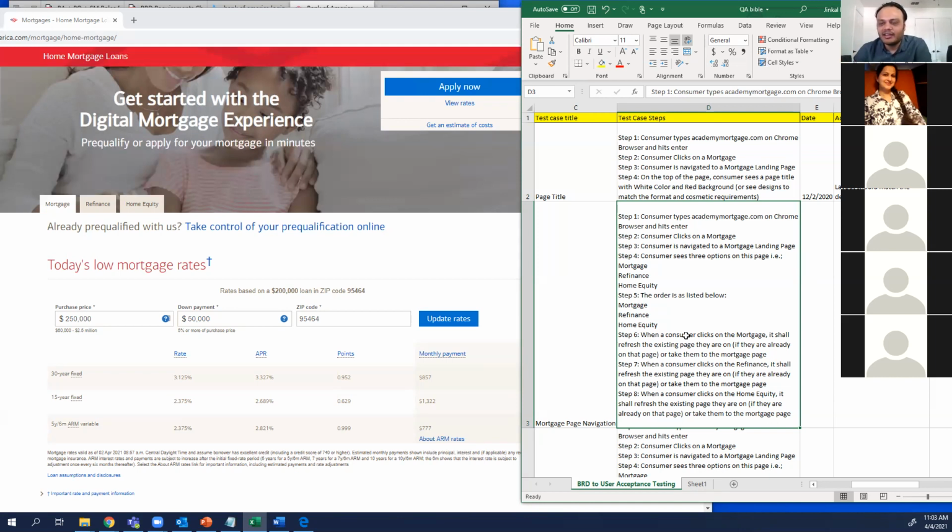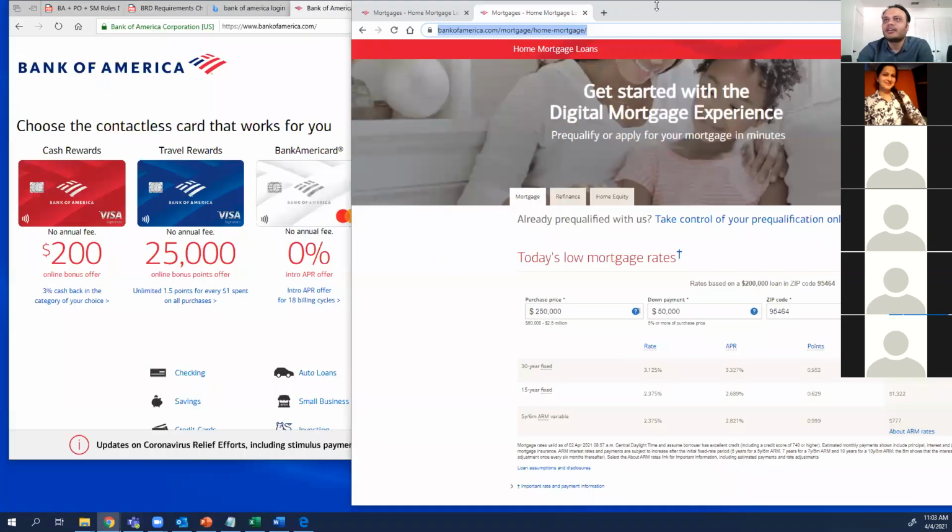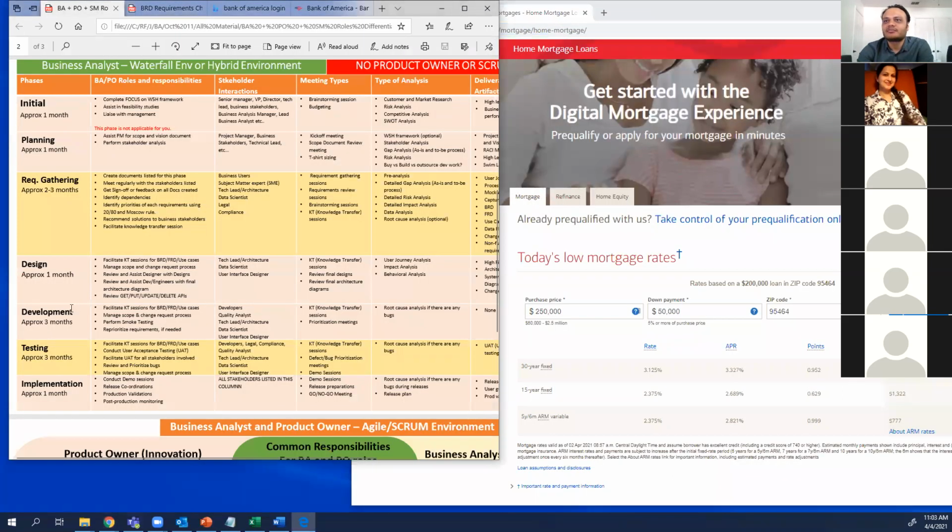When they're writing BRD, they can think about 70-75% requirement. By the time they complete FRD, it will be about 85%. There is 15% that will still come in. That is the reason when we're in development phase or testing phase, in these 2 phases, we always manage the scope and reprioritize scope here.